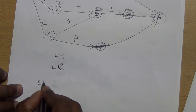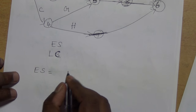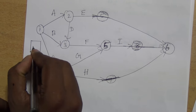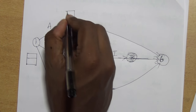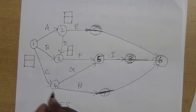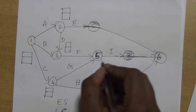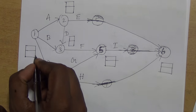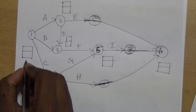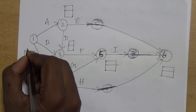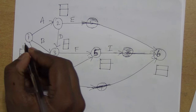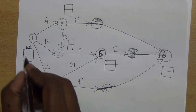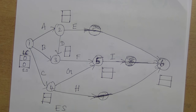So we will calculate earliest completion time using a formula. For every node we put a box that consists of two areas: one is earliest start time and the other is latest completion time. The bottom one is earliest start time and the top one is latest completion time. Normally for the first node of a project, earliest start time and latest completion time will both be 0.